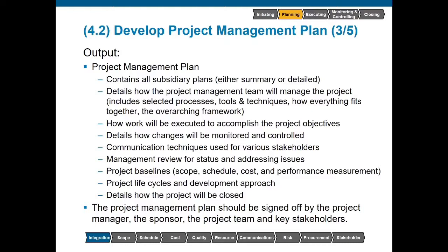The PMP will also detail how the project management team will manage a project, including selected processes. So if we decided to tailor the framework, we would go ahead and document that here. How work will be executed to accomplish the project objectives. How changes will be monitored and controlled, which will be listed as part of the change management plan. How we will communicate with our various stakeholders. How management review and progress reporting will be conducted, as well as the addressing of issues.